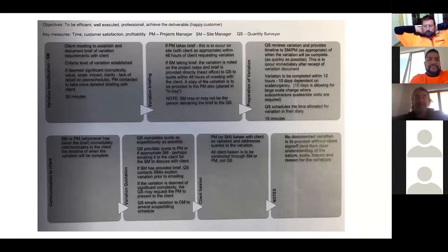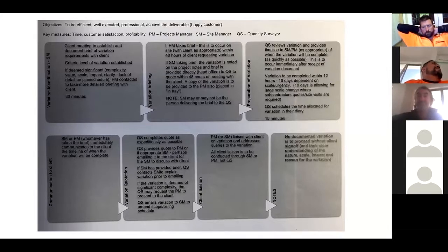Just listening to what everyone else is saying and working out that there should be a process for this from the start, rather than going, oh shit, I forgot to put this in, and then going to the client, now I need some extra money for this, and them saying, but I thought this was a fixed price contract. What's going on? Exactly. Position it up front with the client. Exclusions in your contract are huge, eh? If you start thinking about your contract and its exclusions, the light bulb will go on, and you'll start finding more and more, but then they become variations, because more than likely the client's going to want to add some of those in.